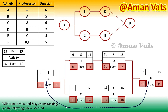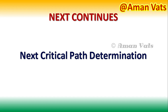This means that to keep the project on schedule, activity C can start at 8 at the latest, and with a duration of 6 it must be finished by 14. This is the method for calculating late start and late finish, as well as early start and early finish. I'm sure you've understood this — if you have any questions, drop me a message. Next we will talk about the critical path method and how to identify the critical path. Stay tuned, subscribe to my channel, thank you very much.